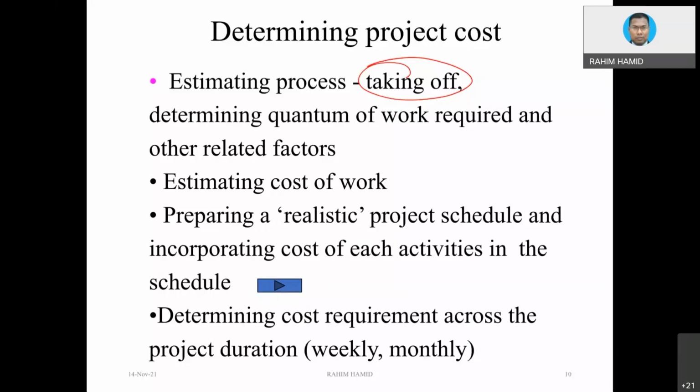But normally for each activity, we associate the direct cost. Whereas the indirect cost, as I mentioned, will span throughout the entire duration of the project. That will be associated with the preliminaries. Then to make it easy, we can divide it by the number of months of our project. So at the end of the day, it is like a fixed cost. And that is the concept.